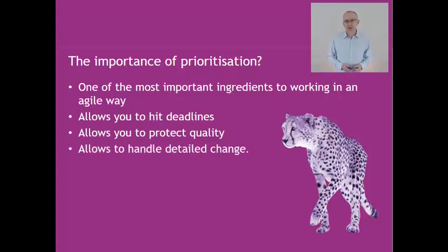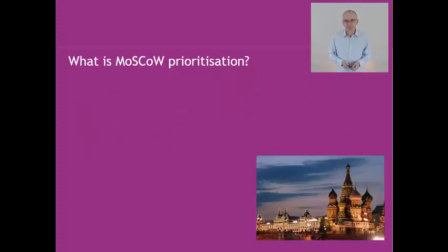Another feature of prioritization is it enables you to handle change at the detailed level. This doesn't mean we rethink the reason for the project. That would be called baseline change. But if we're trying to fine-tune our understanding of what we're trying to achieve, then the idea of trading things in and out and prioritizing is a very important thing to do. So prioritization enables us to get a more accurate solution. It enables us to respond to changing circumstances that may take place on the project.